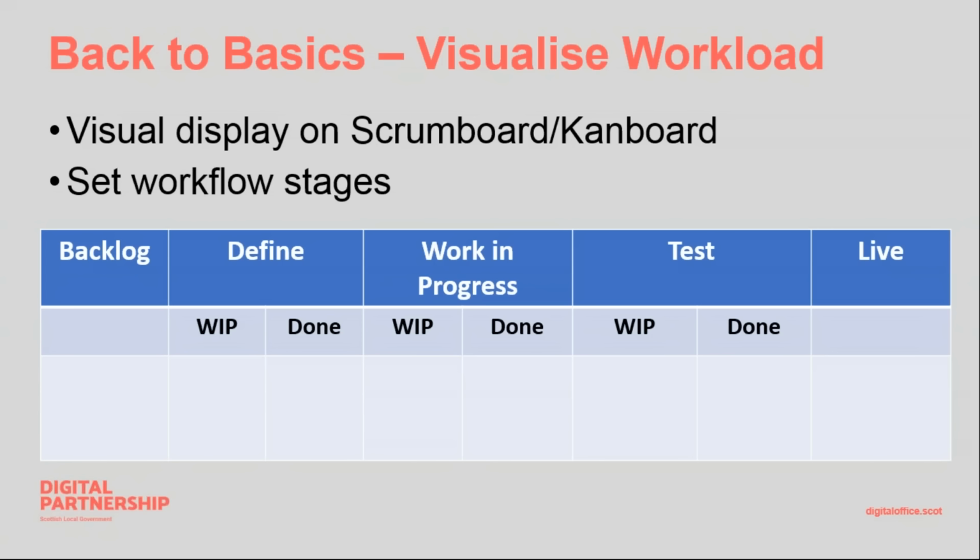So here you can see this is an illustration of our Scrum board. We basically bought a whiteboard and we cleared the space, stuck it right in the middle of the team propped up against the wall, and then we started to create different stages on the board which combined together gave us our natural workflow in the team.